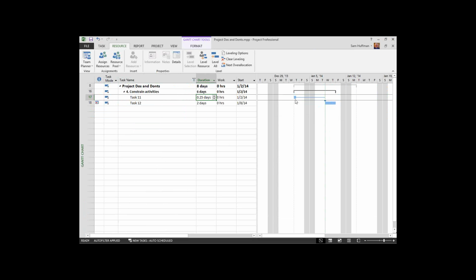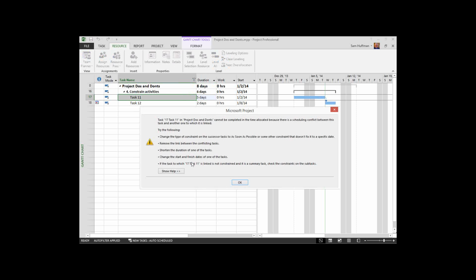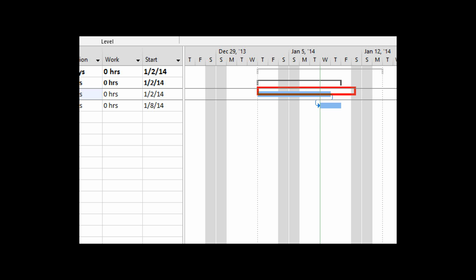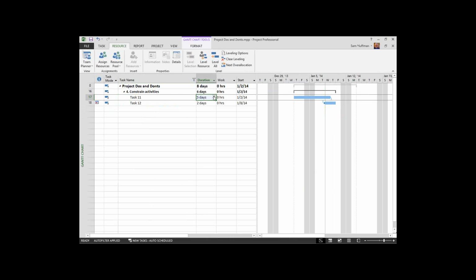Watch the screen as I increase the duration of the predecessor, bearing in mind as the predecessor approaches the task start in a schedule, we would hopefully see that task begin to back up into the future. Here we go. Here's 4 days of activity. And by increasing it to 5, we'll see the start of task 11 move to the right. But what you will see with this type of constraint is that it simply brings up an error message and then allows it. Now, I want to show you one of the hints that there is an issue. It's right here. This is when the task should be pushed out into the future, but can't because of the doggone constraint that we applied to it. It is locked to the time scale, so that no matter what we do with our predecessor, I'll increase this to 10 days to make the point.